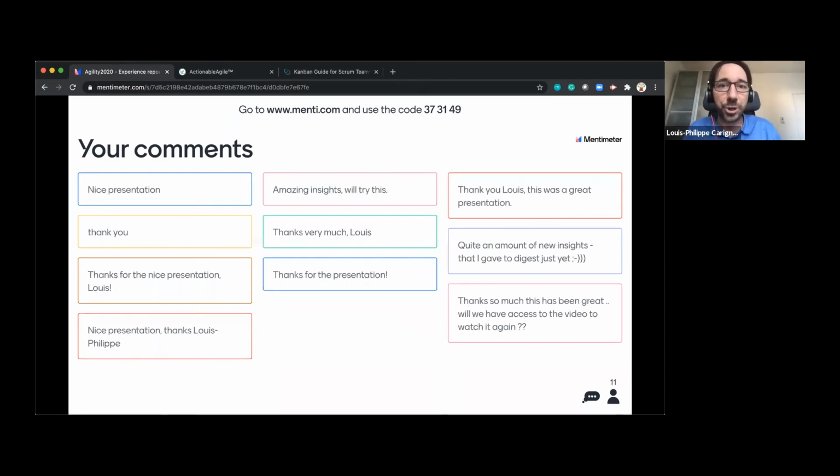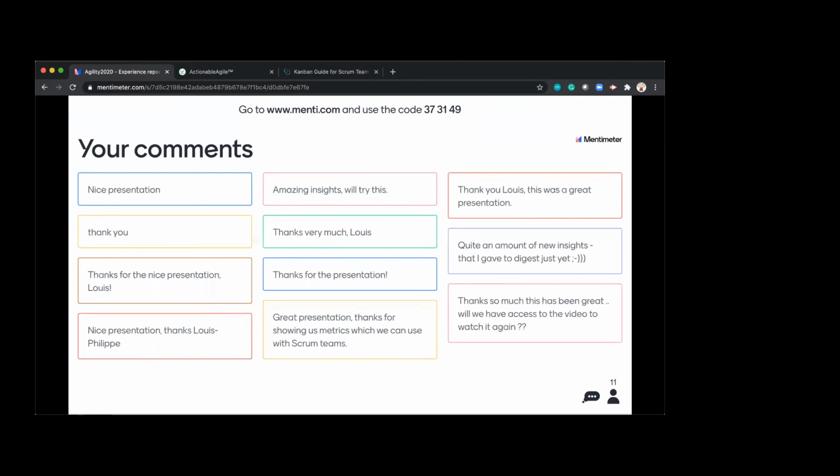Also, maybe looking at forecast. If I've got a lot of budget, project manager people buzzing around the team, should I get some kind of forecasting tool to help answer those questions if that's something important? If work is not getting out, I'm also going to use the age of items to see how come they're not coming out. So maybe even replacing complementary practices like subtask or task, where people put hours on. Can we just change that and follow the age of items? So I'll try to juggle around all those concepts. All right, I'll stop here.